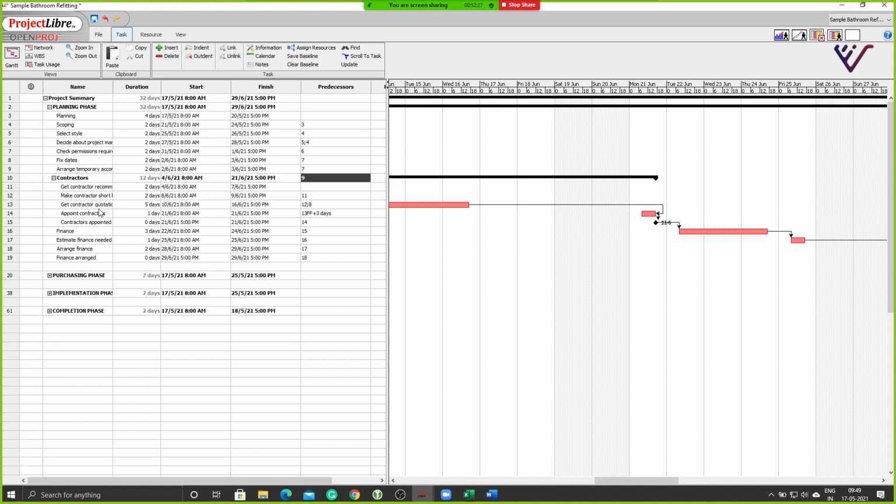So the last contractor quote that I get should be ending on 16th June. And from then on I am giving 3 days time, within 3 days time, for this activity also to be completed. Make sense? Yes, sir. Yes. So that's how you add finish to finish, or you can also add start to start.